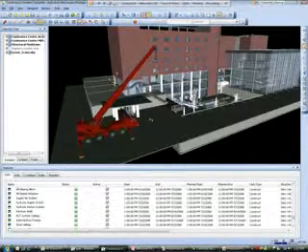If you're working in a tight site, you may not have the luxury of being able to freely move equipment around. So you need to be able to plan that out and figure out, if I position a crane or some other piece of equipment in this particular area, is it going to give me the reach necessary for that? A poorly positioned crane is not only going to cut down on the efficiency, but it also could technically pose a safety issue as well. So very easily, I'm able to drop equipment in.